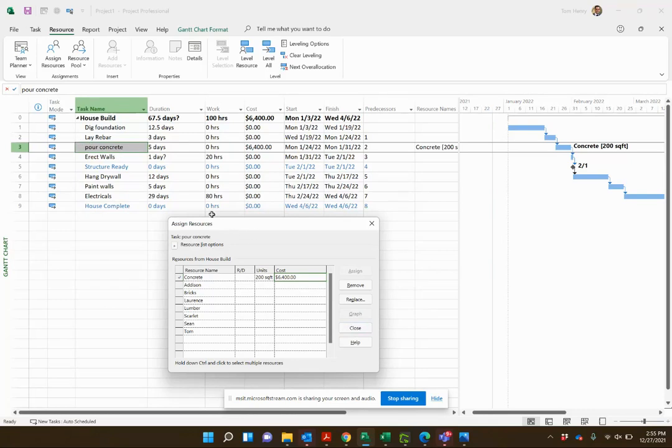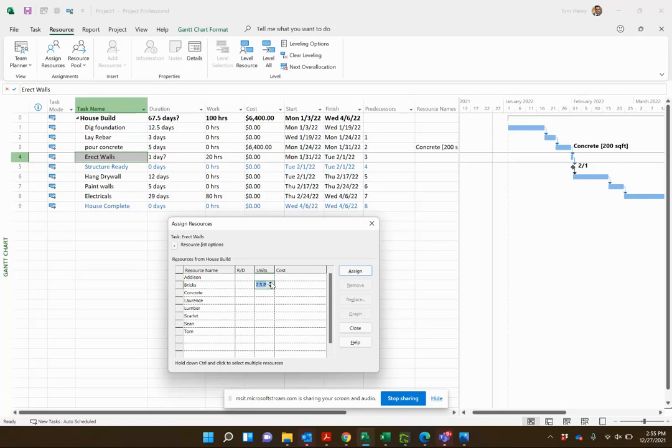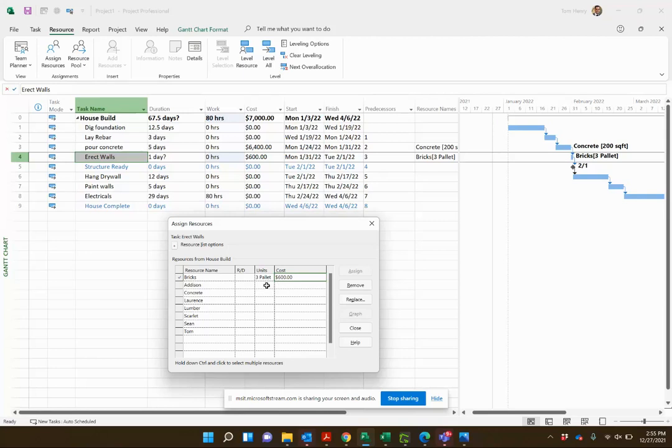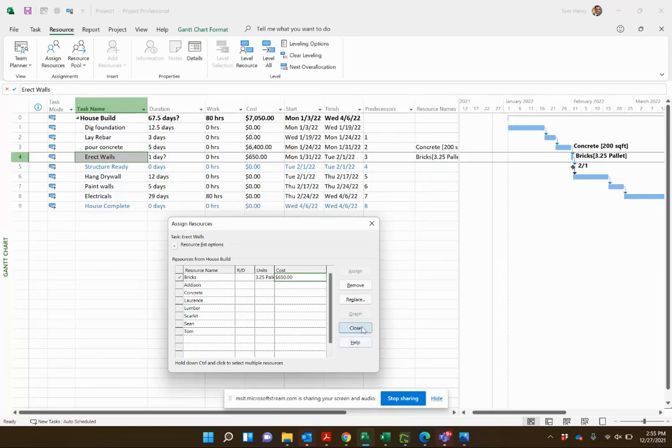Instantly we can see it's going to cost us sixty four hundred dollars. Another thing I like about this dialog is I can actually come in and say erect the walls, we're going to need some bricks for that. How many bricks do we need? Say I need three pallets. I can calculate, two hundred dollars a pallet, three pallets. You can even do three point two five pallets if you like, it'll calculate it accordingly. Not sure that you can buy a quarter pallet, but you get the idea.